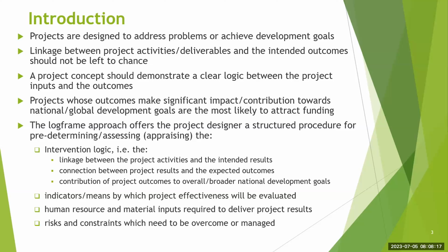And by this, the logical framework approach helps you to predetermine or assess right from the beginning what's going to be the linkage between the project activities and the intended results that you want to have at the project level. And then again, assuming the results of the project are achieved or the outputs are delivered, how is that guaranteed, or how is that going to lead to some expected outcomes? And should we achieve the outcome at the project level, we would need to be able to demonstrate, and this framework will help you to tell clearly, the overall contribution of the project to national development goals.